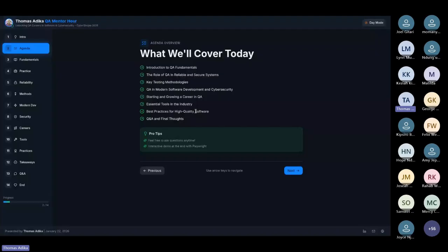For us to be paid, the client needs to come see the houses and make sure that they're okay. That's where I come in, quality assurance. I'll come check if the client wanted cables for Wi-Fi for all of the houses. I'll make sure there are cables for Wi-Fi for all of the houses. If there are none, I'll document that on a book. If you wanted 10 windows per apartment, if there are 10 windows, that's okay.